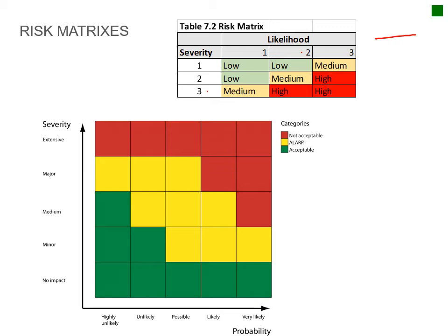So in this instance, your risk will be highlighted as a high. It might even be a 3, which will also highlight it as a high, but because it is quite a severe incident, even if the likelihood of it is quite low, you will still sit with a medium-high risk. So that's the thought process that one goes through in identifying the risk priorities on site.